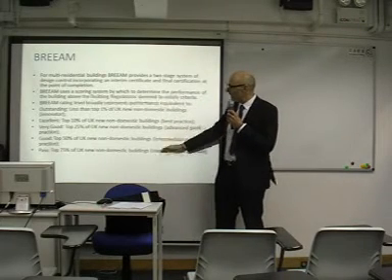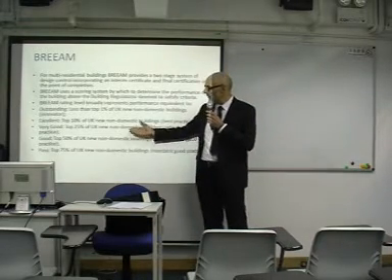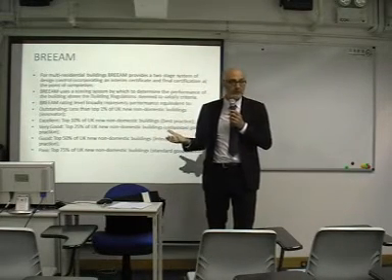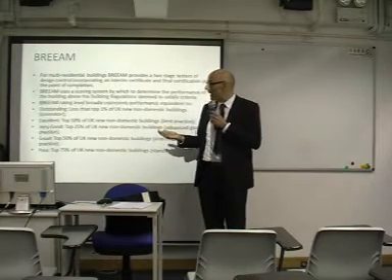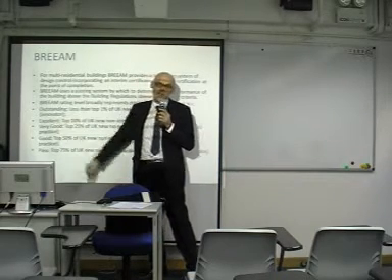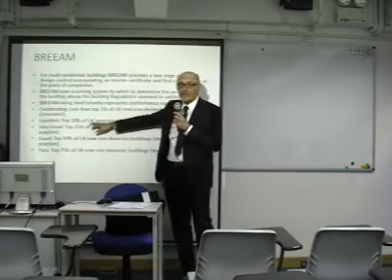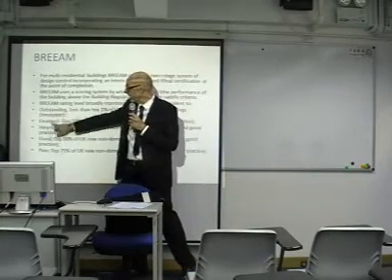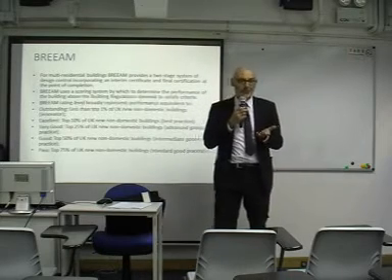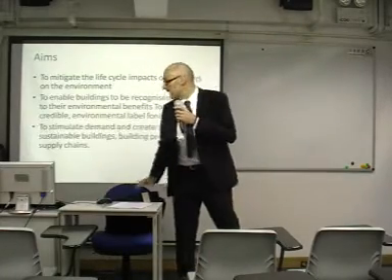Now, apart from building regulations stepping this up from good to very good over the last decade, many of the local authorities now use BREEAM as part of their planning procedure. So, for example, in city centres such as Manchester, London or Leeds, Leeds City Council are now saying the minimum design standard you can go to is excellent. So you don't get planning permission for your office or for your hotel or for your school if it's not equal to excellent. So this is where we're tending to debate, looking at outstanding and excellent now for any new building design consideration. So everybody has to be an expert in BREEAM in order to get their building through it, okay? So that's the other method of pushing design innovation.